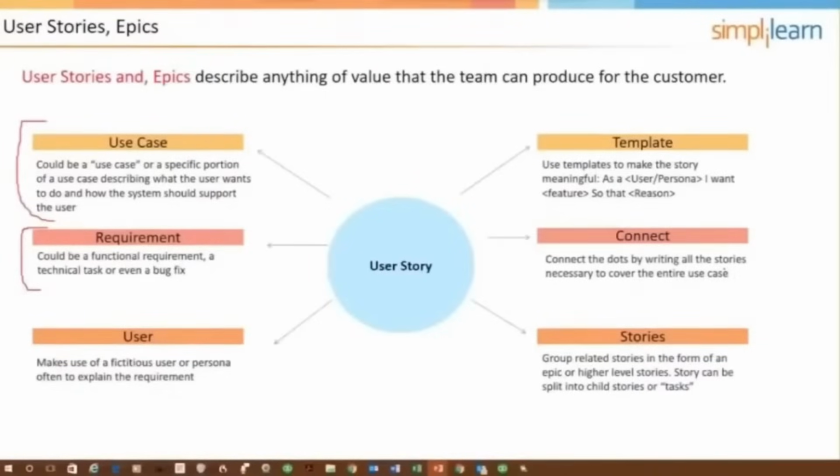Now, what could happen is that the product owner ranks these in priority. So this one first, then that one, then that one. And the team says, well, the only thing is that we have to do some development work before we can actually do user story 2. And so what we really need to do is insert that before the second user story.